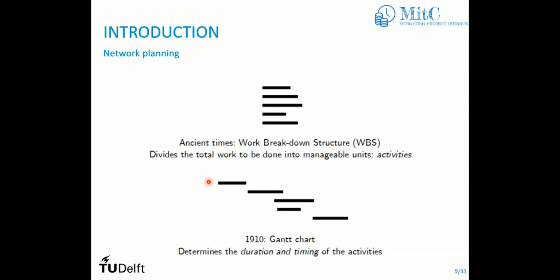The second step is to do the scheduling, to schedule the activities one after the other. You have to specify when every activity starts and finishes, and when the next activity starts, and of course the relationship between these activities. So this activity must start just after that one. There's a kind of dependency here. So it is scheduling activities, but also identifying relationships between them. And finally, the duration of your project is going to be from the start of the first activity until the end of the last activity.